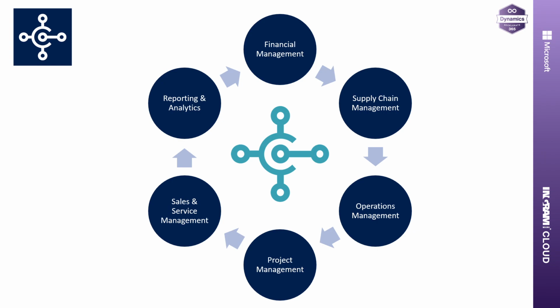And within the project, we've got different phases with gateways. Each of the phases breaks down to tasks that can be allocated against individual resources, start date, end date, with a budgeting structure specifically to that project, so that we've always got a forecast of expected cost, capture of actual costs through timesheets and material allocations, so we can always see, are we on track against the project? What's the forecast revenue? What's our actual and expected cost of goods sold? So are we financially on track against that project as well?